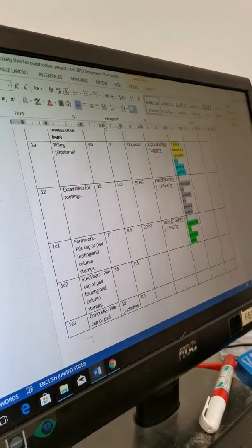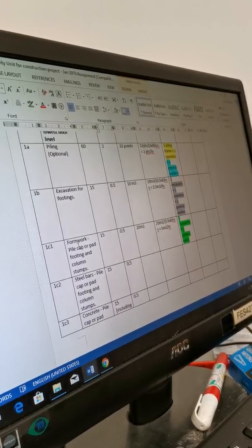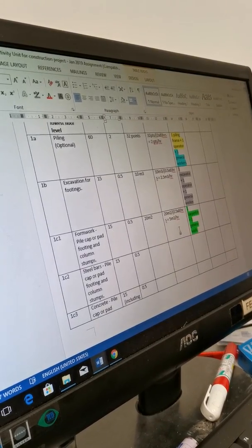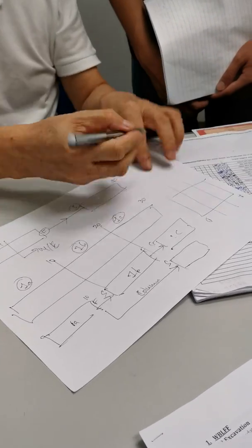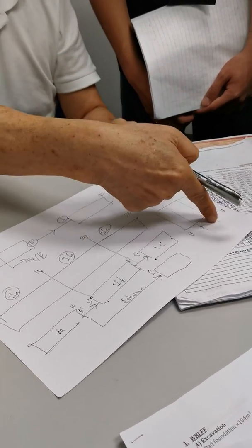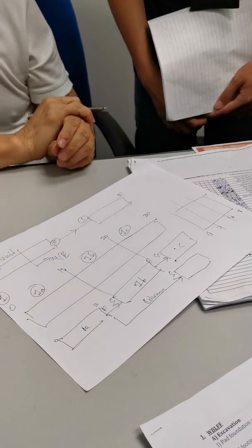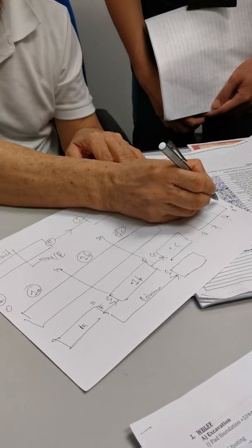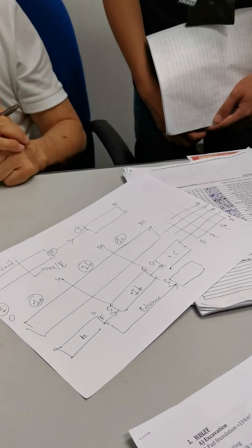If you think about formwork and power cap, the term you use may be in terms of axis or in terms of percentage. I think axis is always the better one for planning, because when you plan your project, all of these have axes. In the project there will be A, B, C. So A to B, or B to C, finish, then what starts. Using axis, it will be one way. Here is ABC, then here will be 1, 2, 3, 4, isn't it? So you can know where they are.